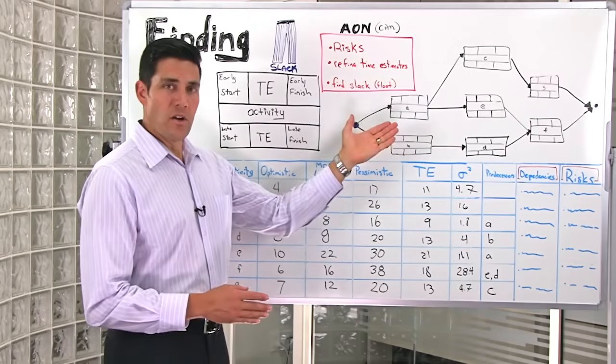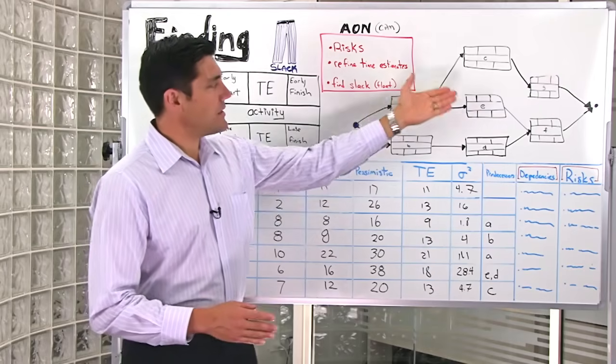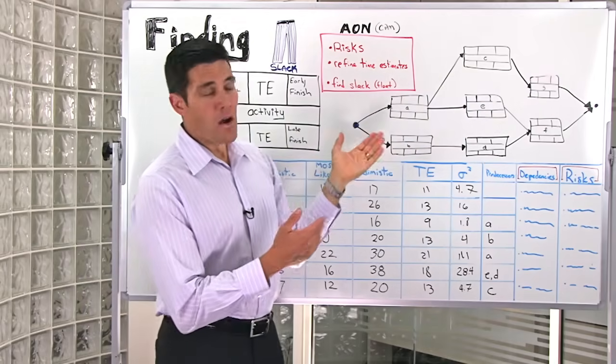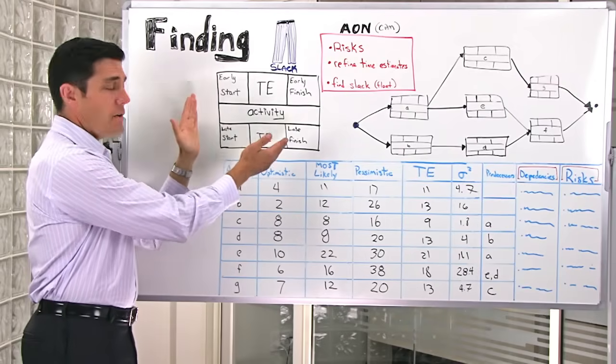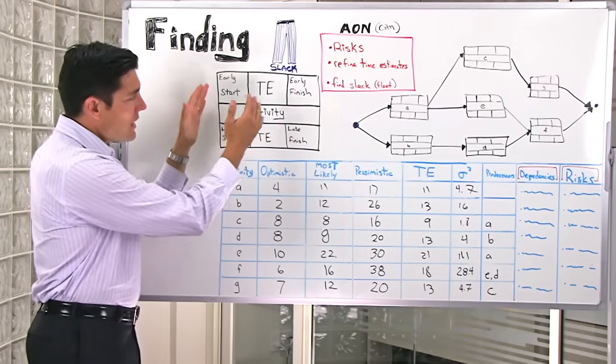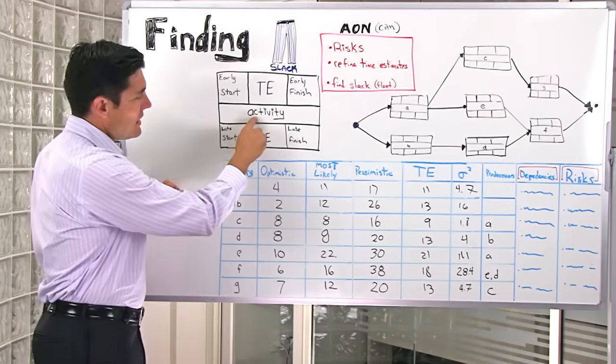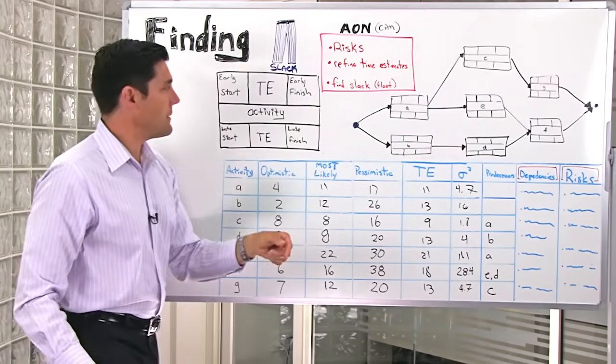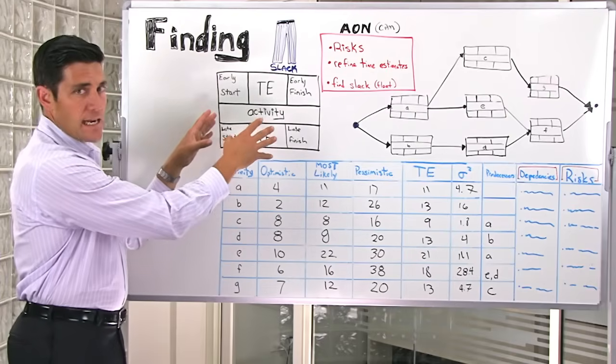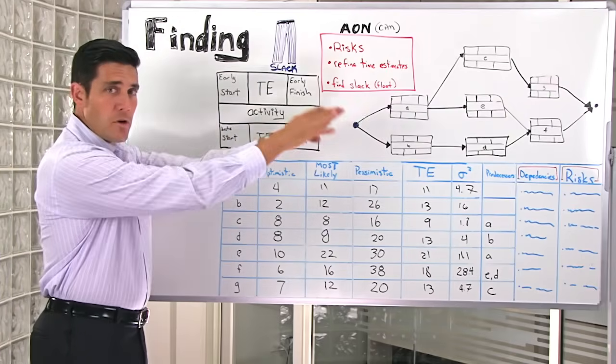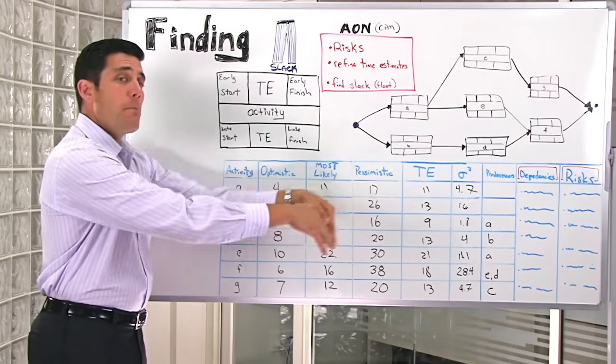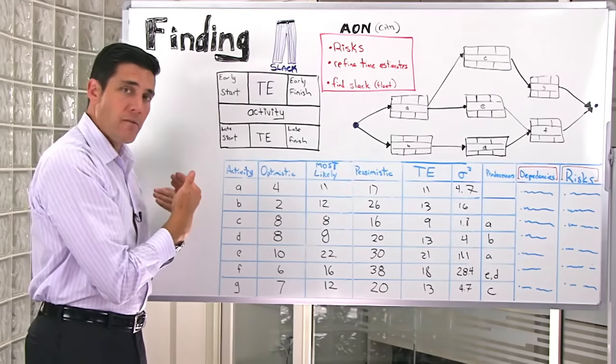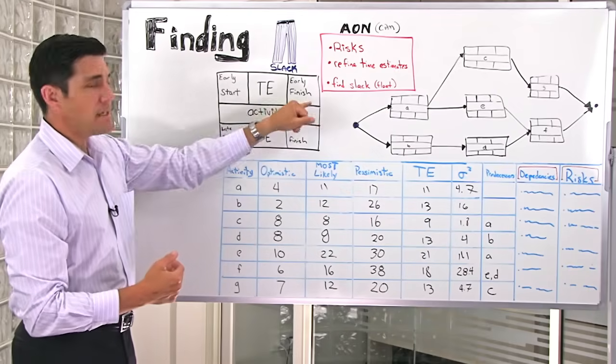In the Activity on the Node technique, each of these activities are designated on the Node. Each of the Nodes is broken down into various sectors. As the Node, we of course list the activity in the middle, as such A, B, C, D, E, F, and G. The six remaining sectors we fill in by doing a forward pass through the network and then a backward pass through the network to determine the float.